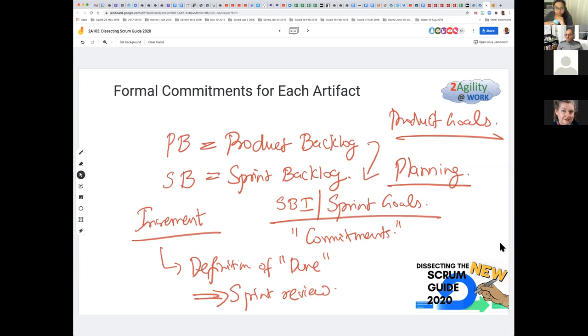That's your product goal. But that's the larger overarching goal, that you want to get this product out to the market. But then you're not going to build all of the product at the same time. So then you go into planning. In the context, you're aware of the overall goal: yes, we have to ship this new product with these new features by this date. You then go into sprint planning, where you say, what can I do in the next 3 or 4 weeks that I can now commit to do?